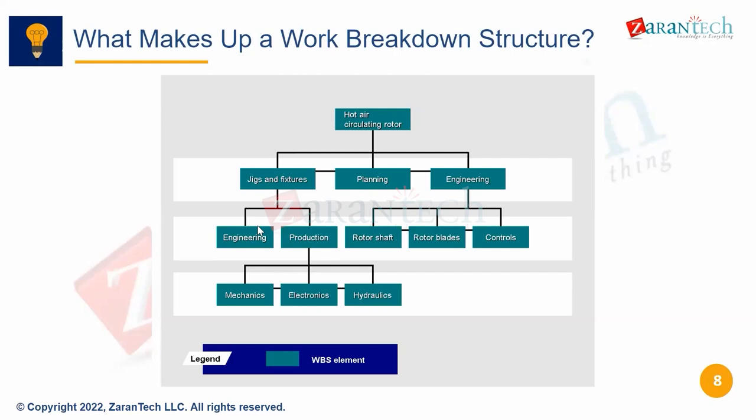A construction also can we take, like pillars, roof? Correct, sir. That is also a very good example. Even you can have construction if you have a building. Let's say you have one building. Then we can have floors. First is the foundation, footing, plinth work, then you have the ground floor, first floor, second floor, third floor. Then within that, let's say each floor has four apartments or four units. So unit 1, 2, 3, 4. Then second floor, unit 1, 2, 3, 4. Then within a unit, you want rooms, then you can have that as well.